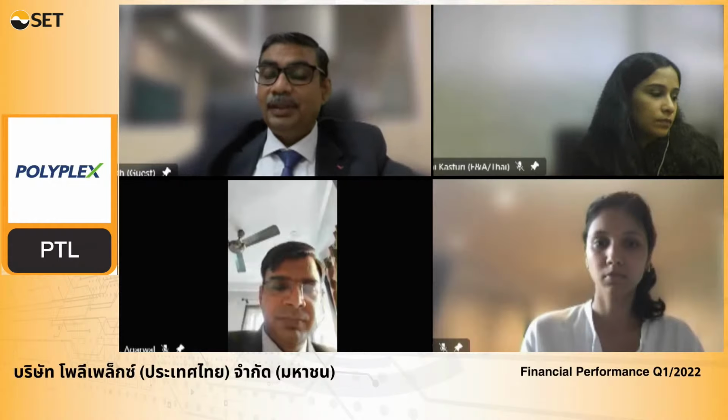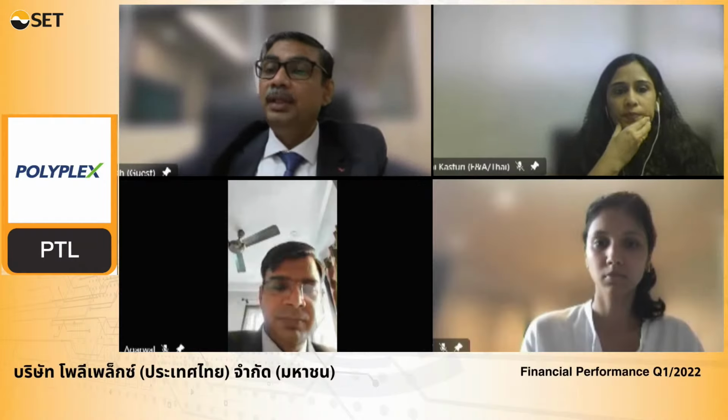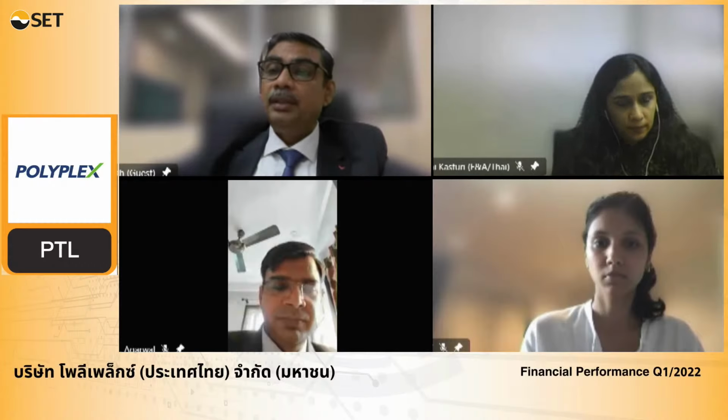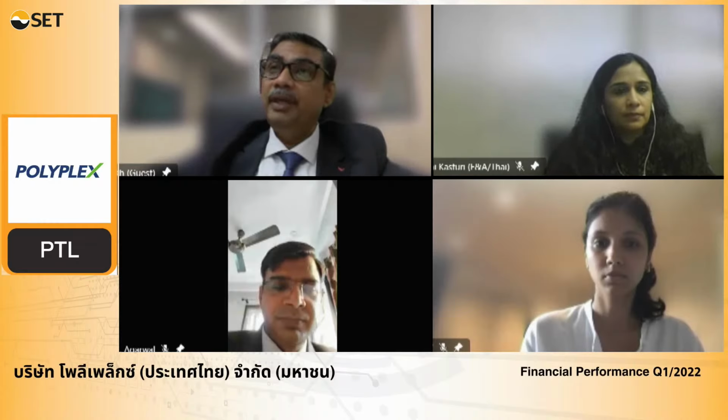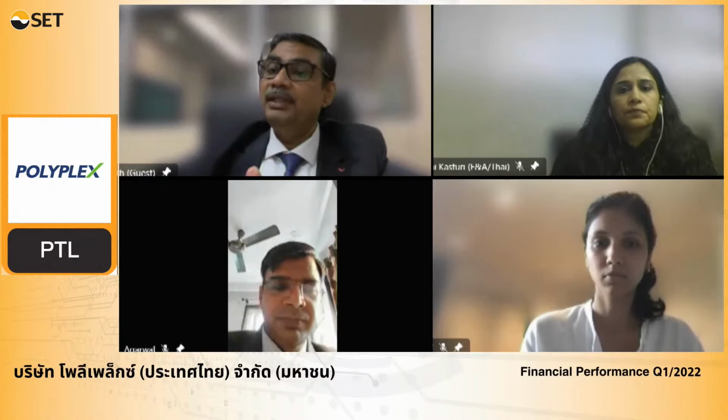Okay, there's another question. Very pertinent question is how is the lead time for new machines for BOPP and BOPET from Dornier and Bruckner? So they continue to be long, and I would say the lead time for a new line would be anywhere between 2 to 2.5 years. And this is because of several reasons. Obviously, demand growth of both BOPP and BOPET industry, and both industry demand are in packaging as well as industrial. So there is a natural growth of BOPET industry around flexible packaging and BOPP industry around flexible packaging, which we have said is growing at 6 to 8%.